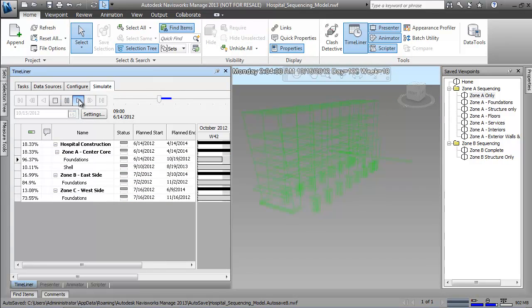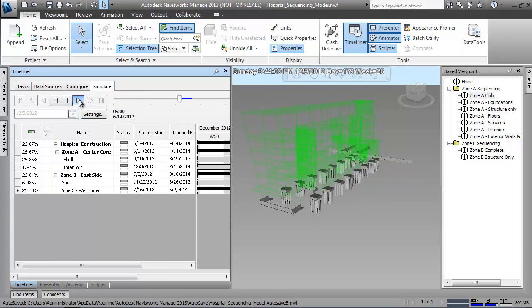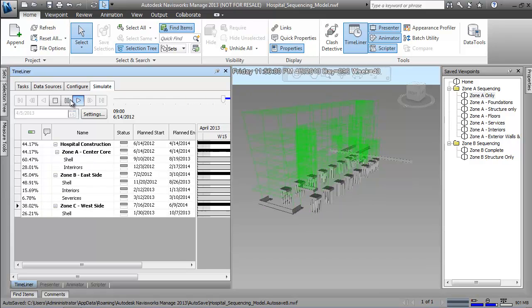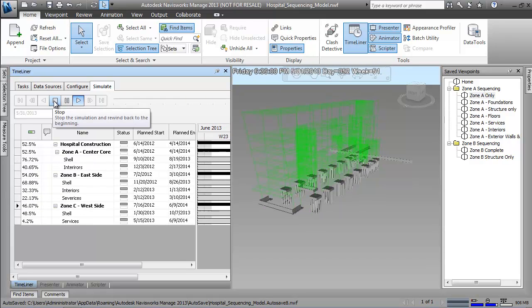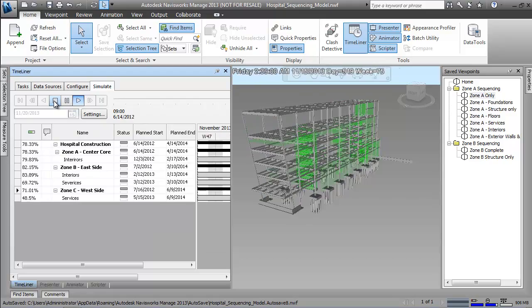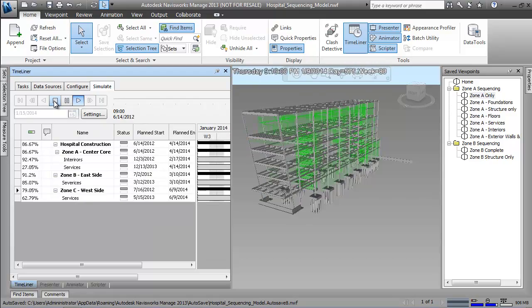Once we have our preliminary schedule and a 4D simulation complete, we can easily share the data with our project controls and scheduling application, in this case Microsoft Project.